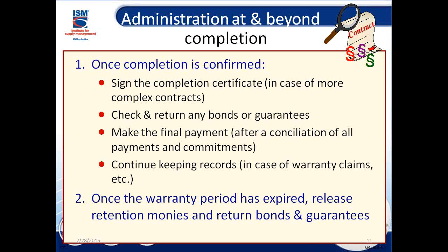In case there are warranty claims, this has to be handled. And tomorrow, for audit purposes, you have to keep the files for a minimum of 5 years. Abroad it is 7 years. Here in India it is 5 years. You have to keep the documentation for 5 years.